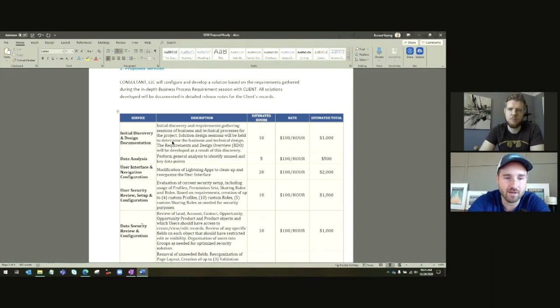And when a client is not giving you proper requirements, it's time to make requirements for them and let them confirm if those are things that they want to do. Now, if they come back and say, what are these? Like, nobody asked for this. This doesn't even sound useful to us. Cool. Then what does sound useful to you? Why doesn't this sound useful? It gives you a starting point.